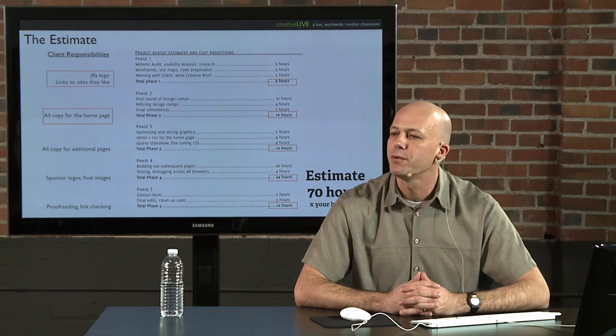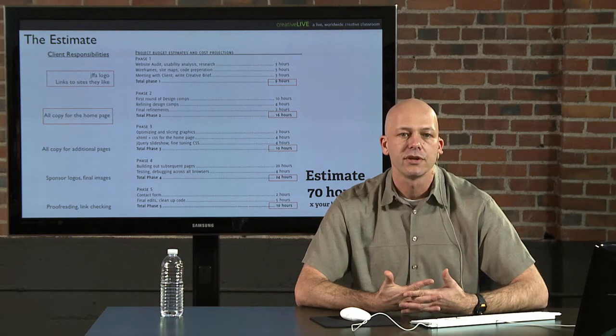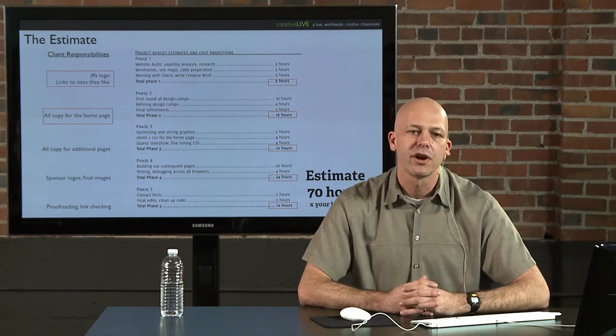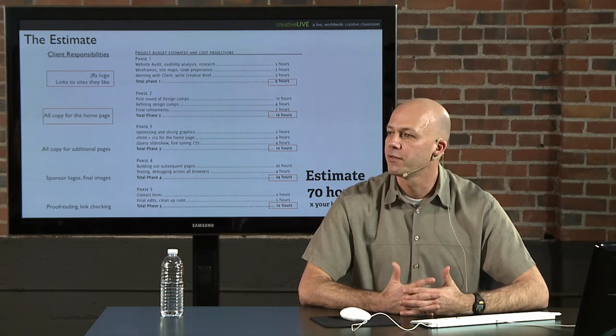By the time I get into week 2, and this is incredibly important, and it's probably the biggest miscommunication between clients and designers, I need all the copy for the site. And I hear this from designers all the time. We say, can you get me the copy? And the clients will say, oh, sure, we have that in a Word doc. It's just in a file. We'll send it to you. And then weeks later, you're still waiting for the copy.